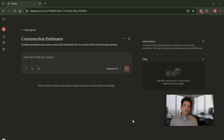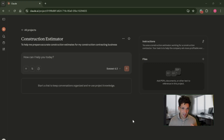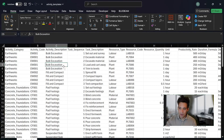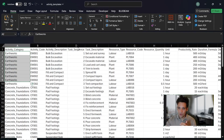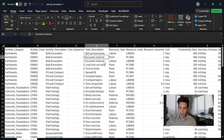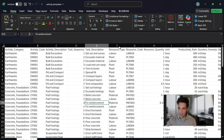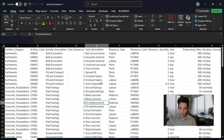For example, if you do concrete work, you might always break down the task based on site preparation, survey, formwork, reinforcement. If you have standard activity breakdowns, include them in the system instructions as files. For instance, here's an earthworks activity template I'm going to upload as a system instruction. It's broken down into set out and survey, excavate material, load and cart away, trim to levels, spread to fill, compact layers. Concrete is broken down into setting out the footings, excavating the footings, blinding the concrete, and fixing the reinforcement, with different resource types for each. This gives us activity templates for each task, and we've also got a set production rate for each activity — for example, excavating material has a production rate of 400 cubic meters per day.